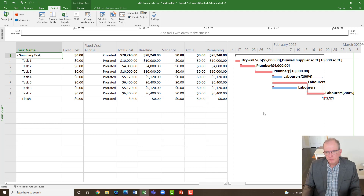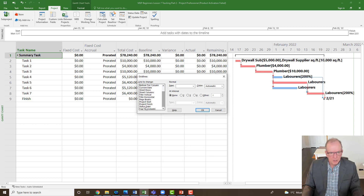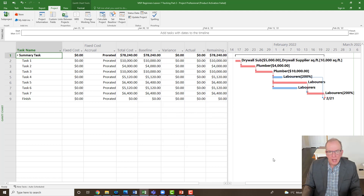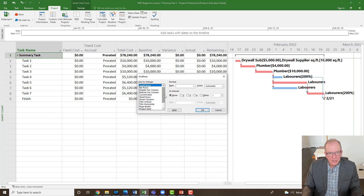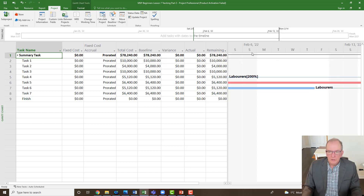What we want to do now is update the schedule and get ourselves into a little bit of trouble, then we'll look at revising it. I'll right-click in the blank area, go to gridlines, pull down that line to change box, go to status date, click solid line, make it red, and click OK. Nothing happened yet because I haven't put a status date in. So I'll go to Project and put in a status date.